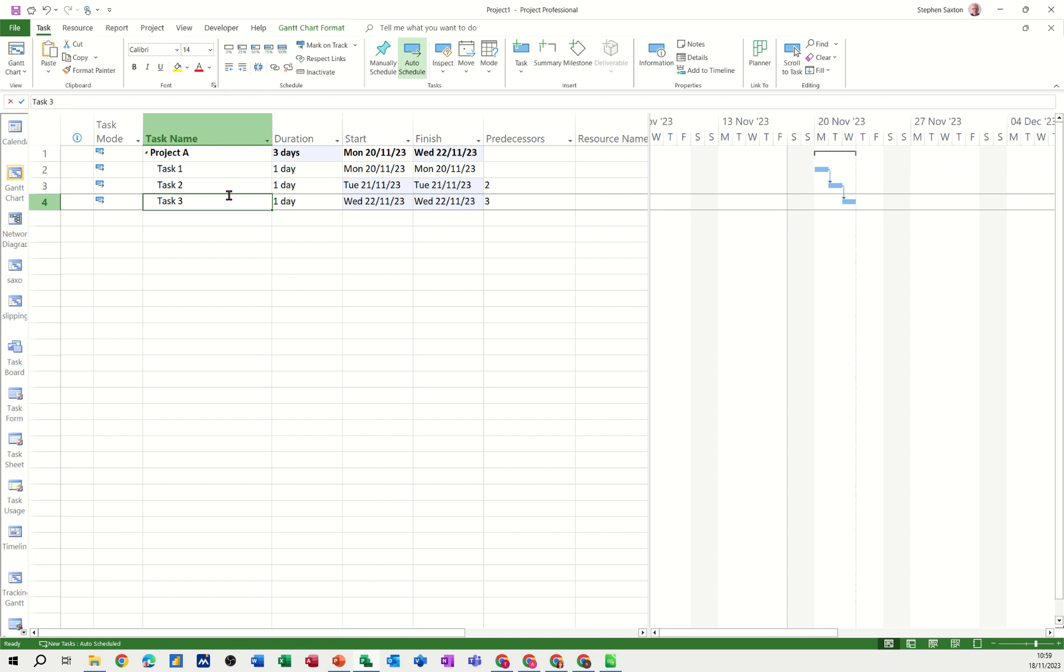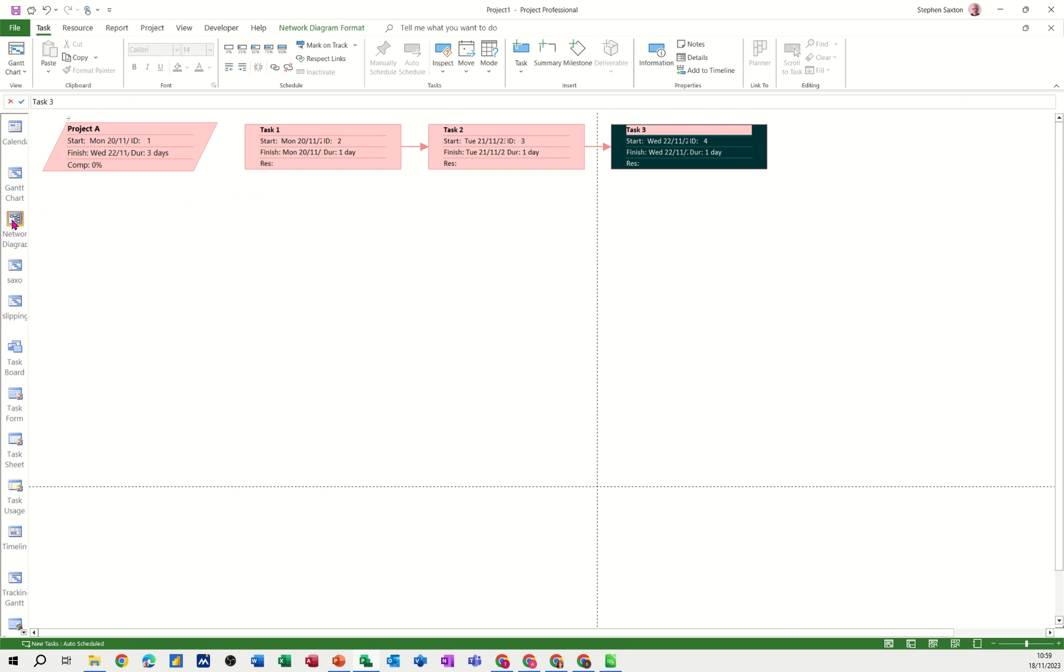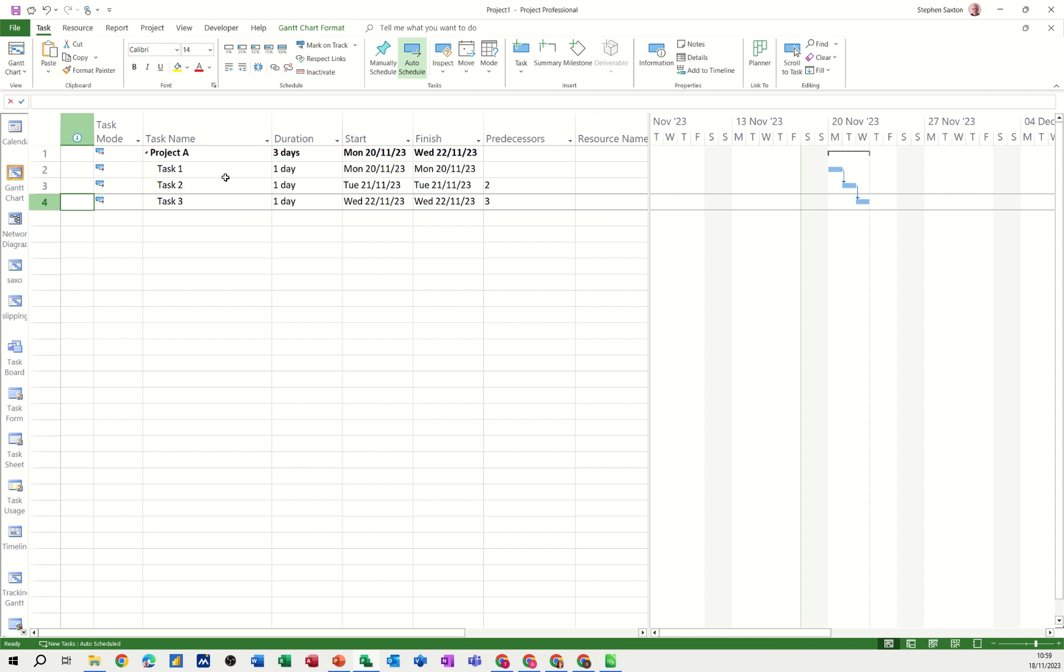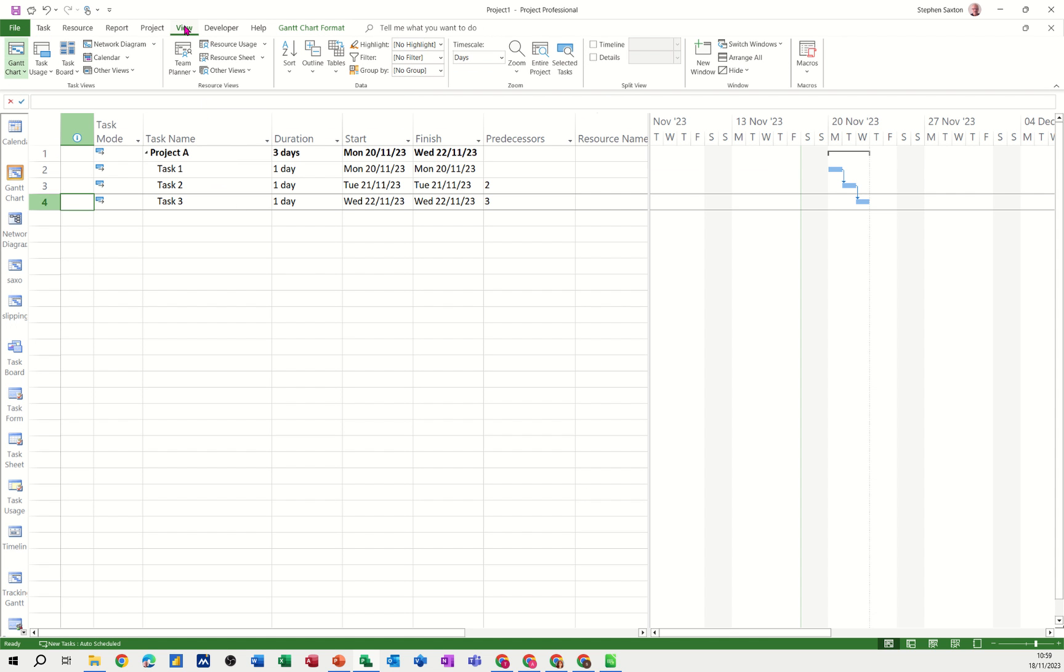Now to get the network diagram, if I click on it first of all you see that's the same set of tasks in the network diagram view. But for that to appear with the Gantt chart you need to use a split screen feature which is on the view tab. Click on view and then over on the right you've got split view.